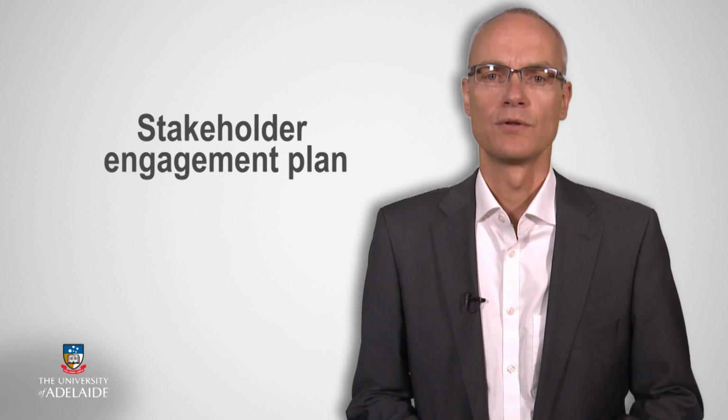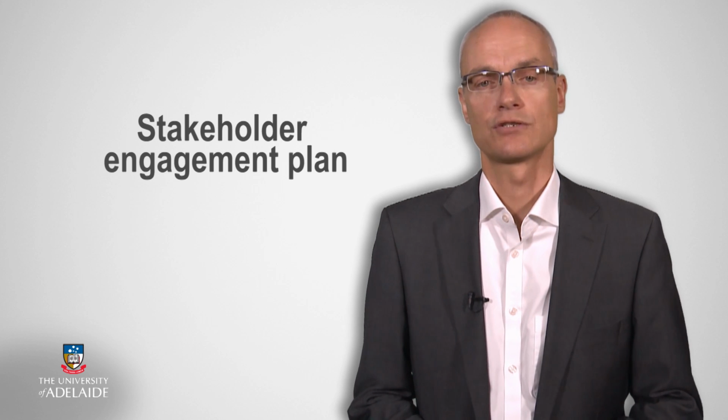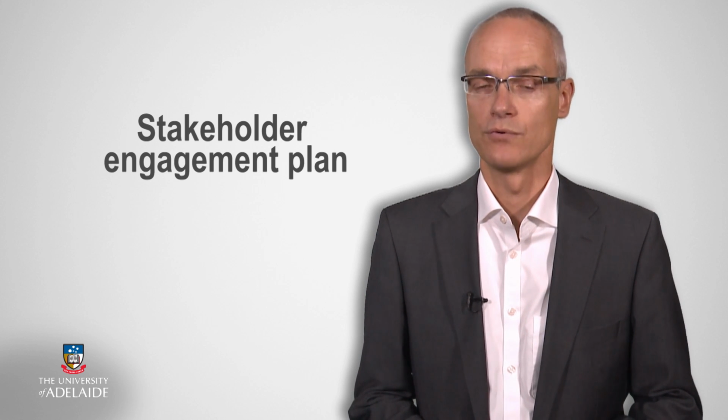It then serves to develop a stakeholder engagement plan to appropriately plan communication strategies and manage stakeholder expectations throughout the project. The objective is to ensure that unhappiness is identified and addressed before it becomes a bigger issue affecting overall project outcomes. This is a confidential document and predominantly used in large and complex projects.